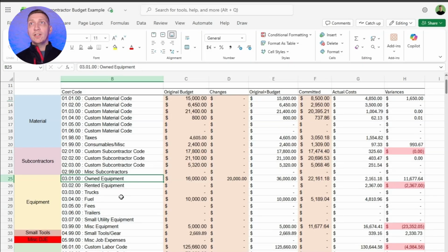They have a conglomerate number that says, hey, this is per man hour or per hour of excavator, it's $300 an hour. And that includes fuel and everything else. They don't really know. Well, that's great, except say it's a 4-hour job and you have a $1,200 drop-off fee. Now all of a sudden, you're actually losing money on that just because you didn't think through all of it.